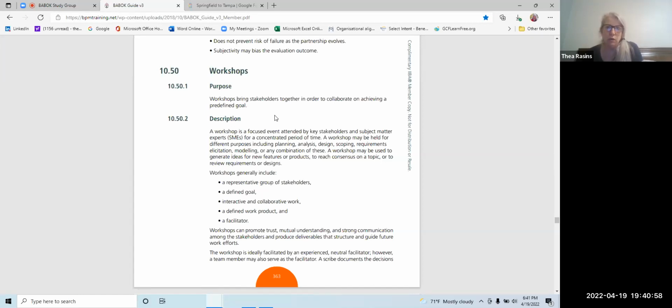And you as the facilitator, the extent of your taking notes is maybe have a parking lot on the wall. Whenever someone brings up something that's outside of the scope of this workshop, or a concern but not to be addressed at this time, you walk over and put it on the parking lot to acknowledge that it hasn't been forgotten, it is being taken note of, but that it is not something that y'all can discuss during this time. I do encourage you, whenever you have someone that has something for the parking lot, that you approach them immediately after that session and say, that was very interesting and I'm really glad you brought it up. When can we talk about it?